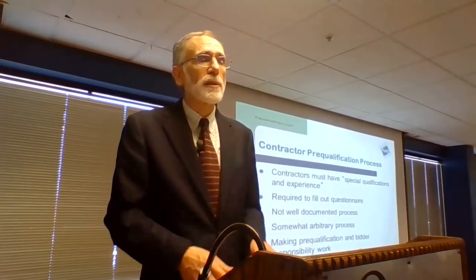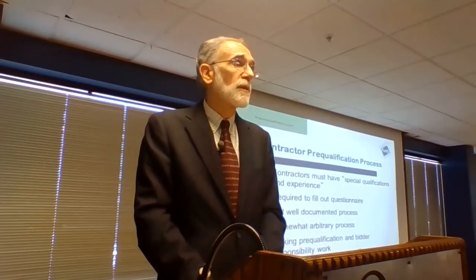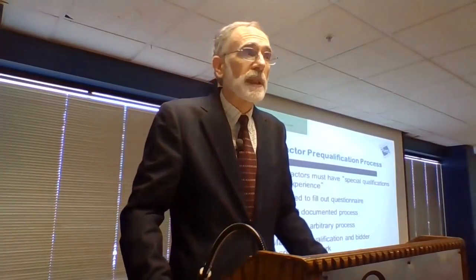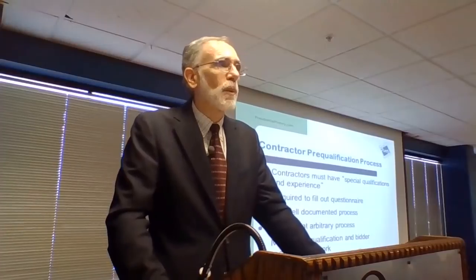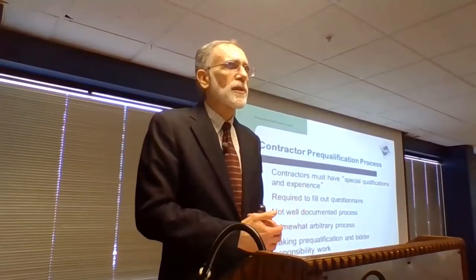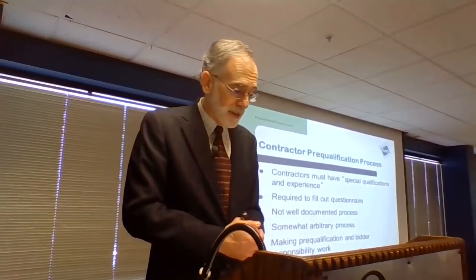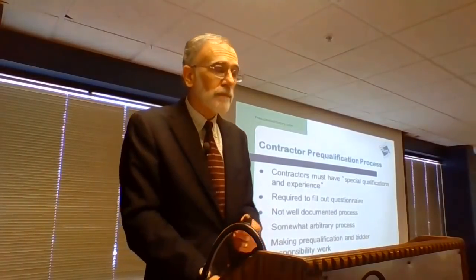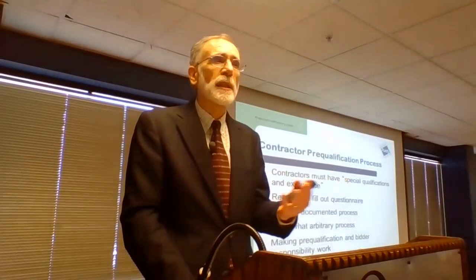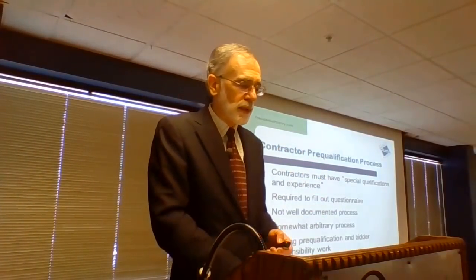So how do you get a contractor to do a very historically significant project like this who knows what they're doing? We face that sometimes when we're doing public construction projects. They decided to go through a pre-qualification process. It was not particularly well documented. It appears to be somewhat arbitrary in how they did it, but they required contractors to fill out a questionnaire and said they had to have special qualifications and experience. So we have that tool sometimes available to us for public agencies, either using pre-qualification or use of bidder responsibility criteria to get a qualified contractor.